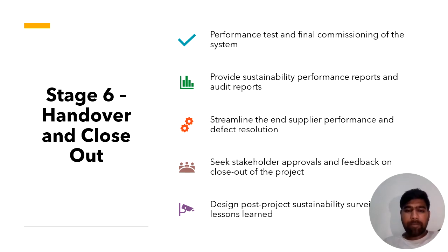We also hold a post-construction community forum to collect feedback and report on social outcomes. Contracts are closed out and we gather lessons learned for future projects. The decision gateway here focuses on whether the project achieved its ESG objectives and whether it's ready for long-term operation.